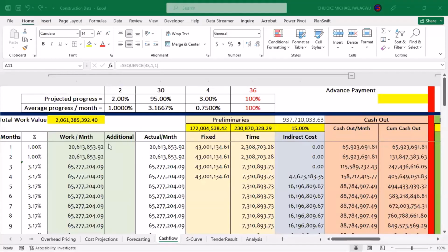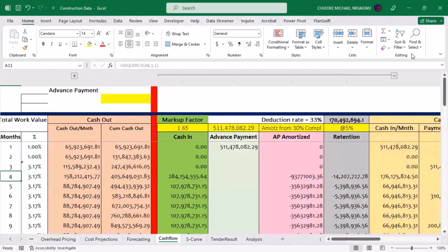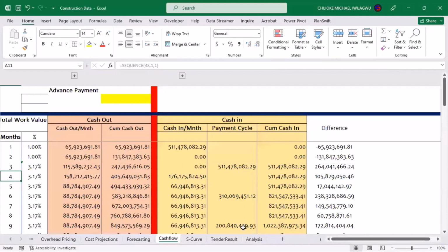For example, if this cash flow that we have just prepared is supposed to happen on the basis of quarterly that you said, now we know that a quarter is from 1 to 3. This is 1 quarter. The second quarter is this. The third quarter is this. So for this quarter 1, what you'll be reporting as due for your quarter 1 will be a total of all of this one that is here.